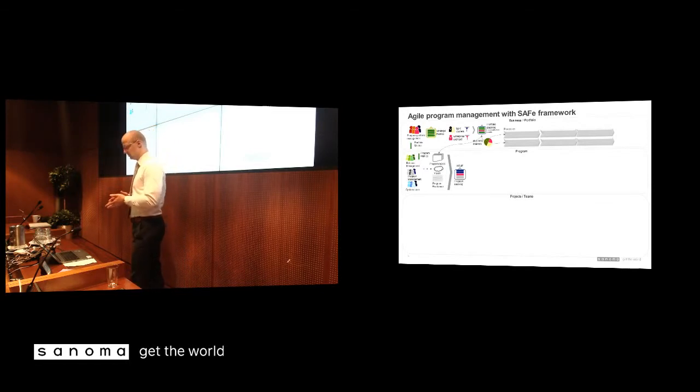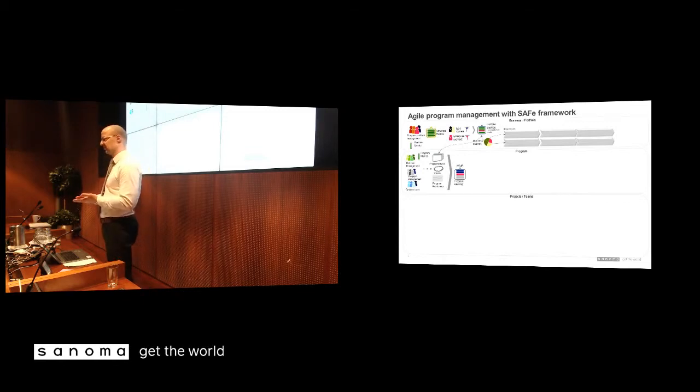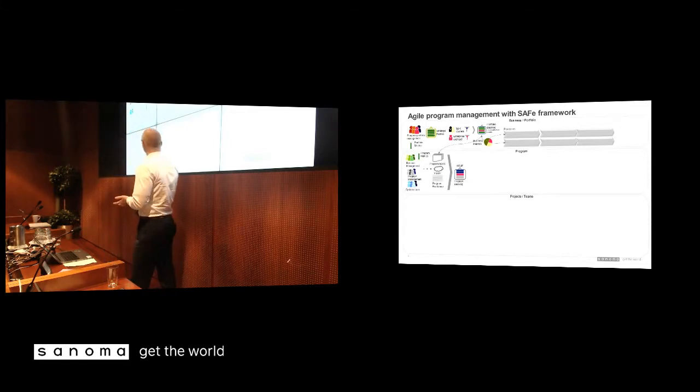Simple rule: let's create first the epic that is easiest to implement but gives us the best impact on business processes. So, weighted shortest job first.